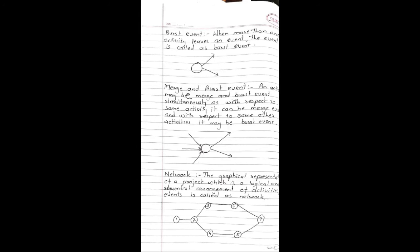Next concept: Merge and burst events. An activity may be merge and burst event simultaneously, as with respect to some activity it can be merge event and with respect to some other activities it may be burst event. In this case, these three arrows are coming together and these two arrows are leaving from the event, so this is the merge and this is the burst.